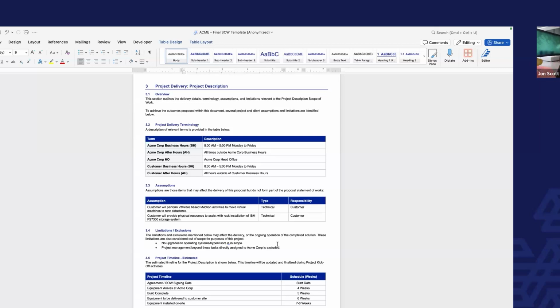However, if you'd like to engage in that, let me get our account manager involved. We can get a change request going, right? It's not only to protect your clients, it also protects you as a firm, and probably more so than the client. But also from the client perspective, right? Again, you have to protect yourself from that standpoint.